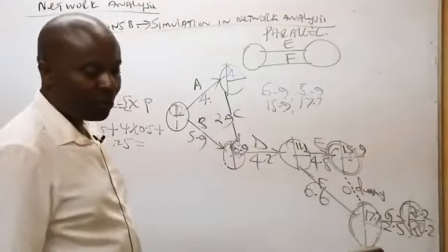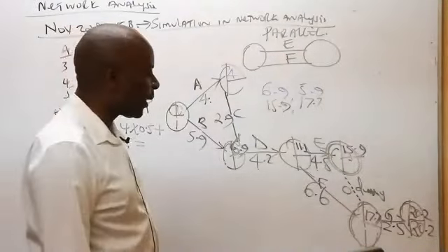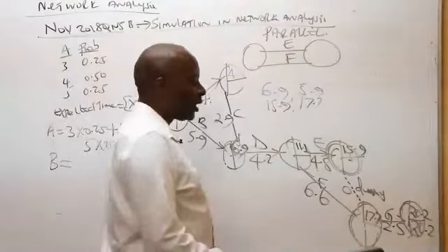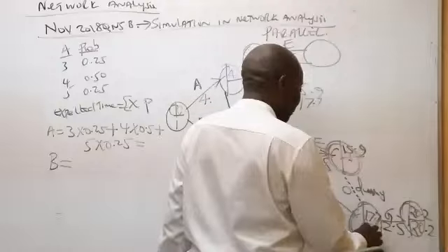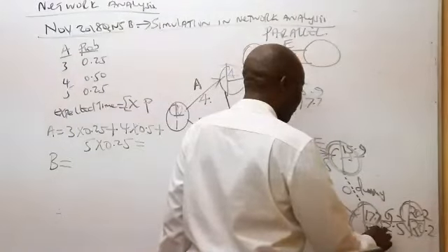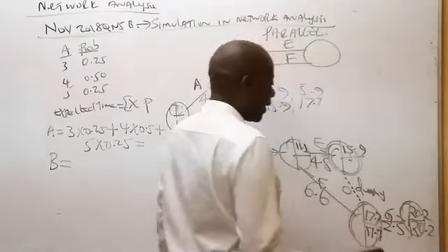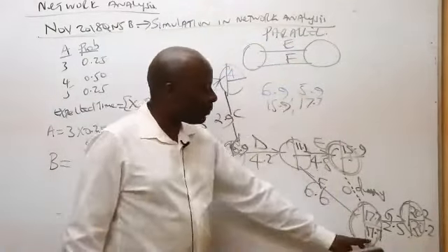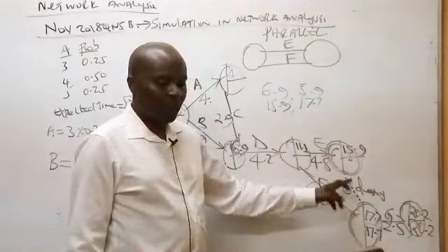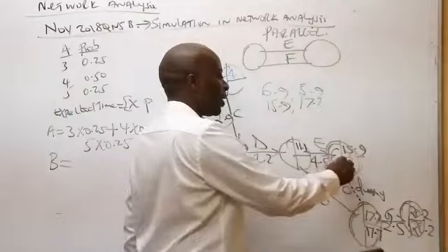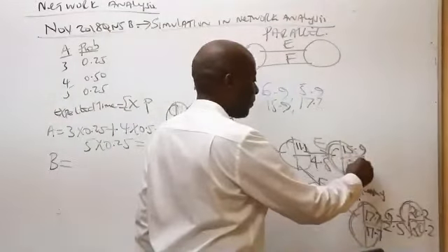Okay, so please subtract back 20.2 minus 2.5. What are we getting? We'll get 17.7. And then we move here, 17.7 and subtracting 0. Backward pass. So 17.7 minus 0, that gives us still 17.7. Great.